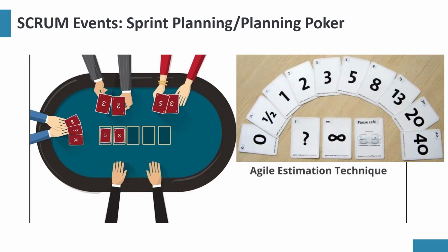But story points work with relative estimation. So if I see a feature that is 3 story points and I see one that is 5 story points, what I'm saying is that the 5 story points is almost twice the work of the 3 story points. And the 2 story points is like 2/3 of the 3 story points, almost 1.5.